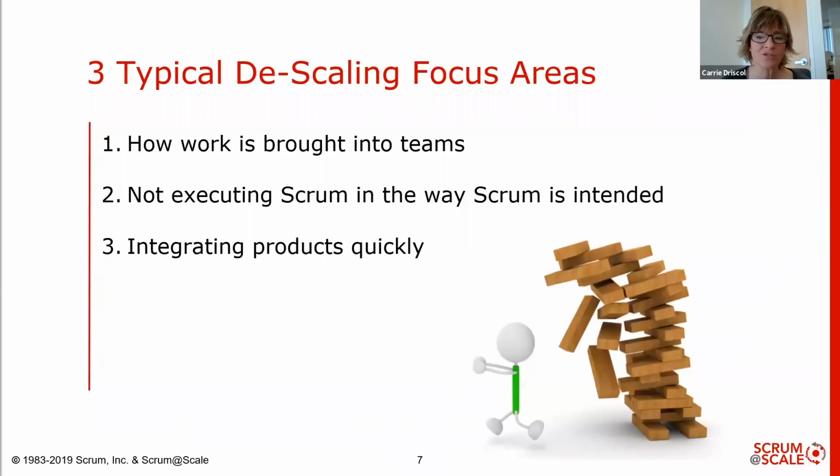If we try to implement Scrum at Scale and speed up the pace at which product decisions are made, but we don't have the supporting structures in place, this will quickly highlight where we have significant waste. For example, if you have a heavy process for vetting and approving product ideas or requirements, your system will clog up, become overwhelmed, and those key decisions, because of that heavy process, may become a large delay to getting product to the customer. We call this decision latency, and it is directly related to successfully implementing Scrum.